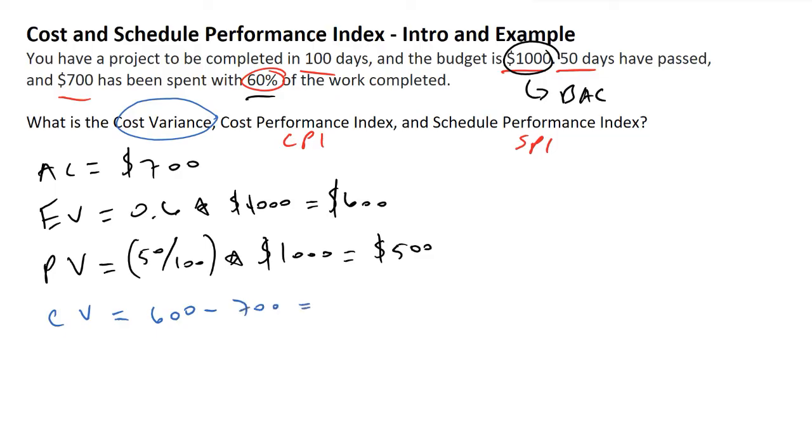Therefore, our cost variance is minus $100. This is another way of saying that we are $100 behind schedule from where we should be based on how much money we've made.